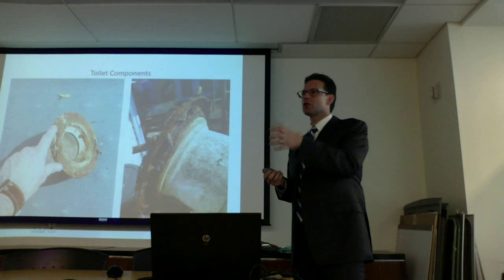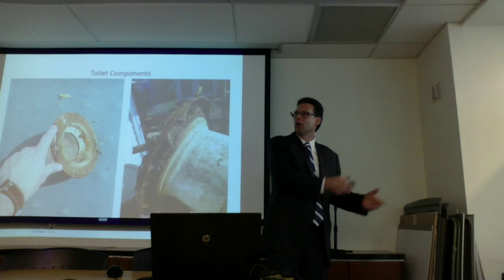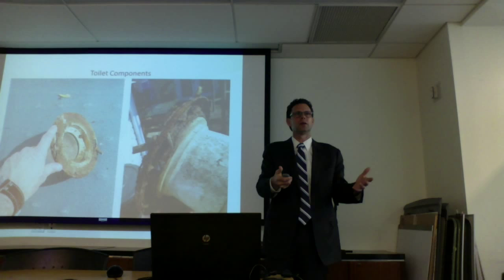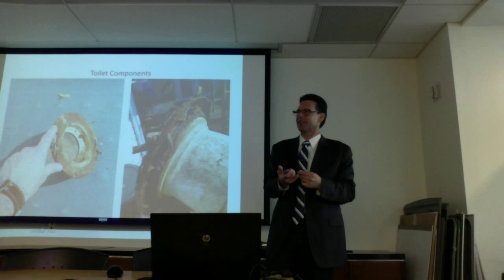So I'm the plumber, I come in, I take the water out, I disconnect the toilet, I unbolt it, I take it and I stick it in the hallway, or I lay down a tarp or a piece of plastic and I stick it in Jimmy's room. Okay, great. Well, in Sandy, there's no room. There's no subfloor that's going to be there. There's no place to put the toilet. I put in my estimates a storage container. And I put in to clean that toilet because you don't really see cleaning of the toilet.